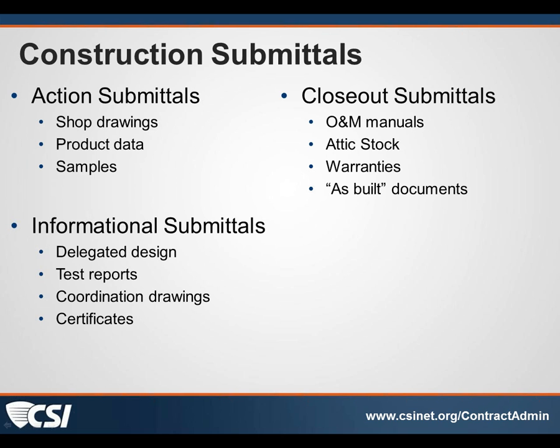Many of the clients we work with are not interested in attic stock. They don't have a way to handle it or a place to store it, and if it does get to the job, it typically gets utilized in the punch list phase and never replaced. Of course, we're there to oversee that doesn't happen, but too often it does. And there's money in the construction budget for that attic stock. So again, looking at your specific client, if you use it, keep it in there. If you don't, get it out. They're paying for something that many times they don't receive.